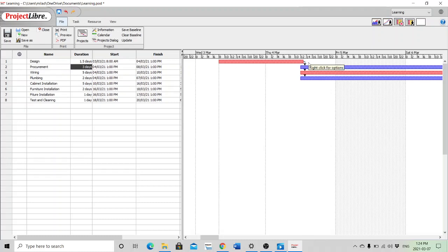the calendars, and also you can change the task, the deliverables and tasks from days to hours. For example, if I want to change these 3 days to, for example, say 20 hours, let's just say 20 hours like this, and it is changed to 2.5 days.